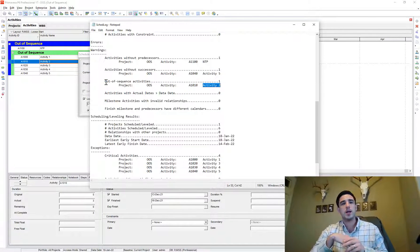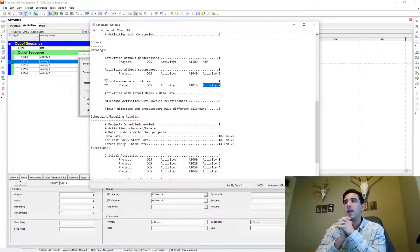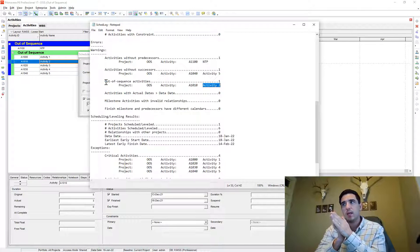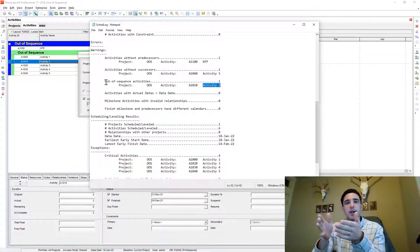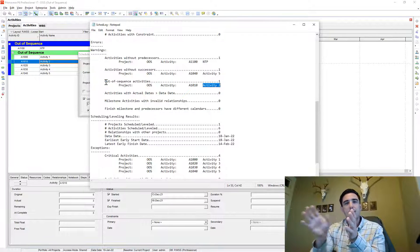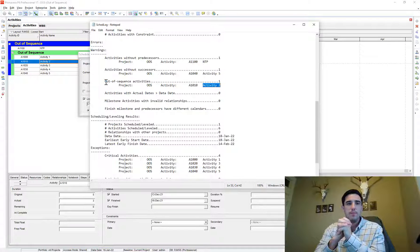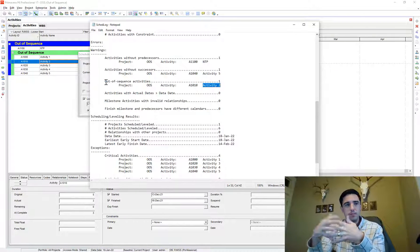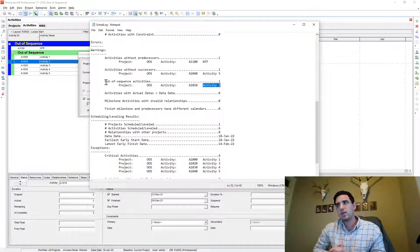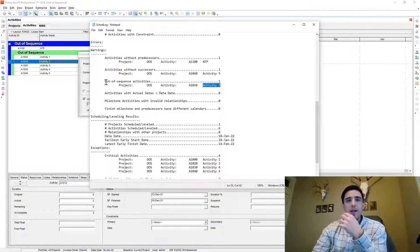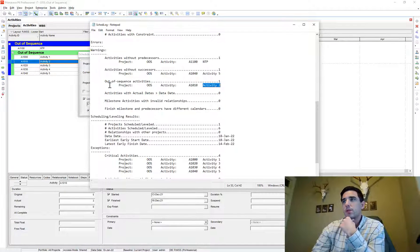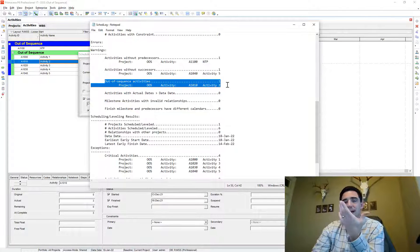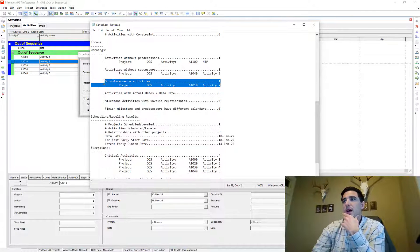What I do, I've seen other videos where people say, well, use the remaining early, like filter for the remaining early start where it's greater than the data date. And I don't like using that method because if your data date falls on a weekend, anything that's in progress, that's on like a workday calendar is automatically going to get bumped out past the data date because they're going to create a gap there. So your filter is not going to be a true filter for the things that are actually out of sequence. So I've tried to find other, I've messed around with other filters and just haven't been able to find like a really good filter for looking for out of sequence activities. And this seems to be the best way to find them is just go to this log.